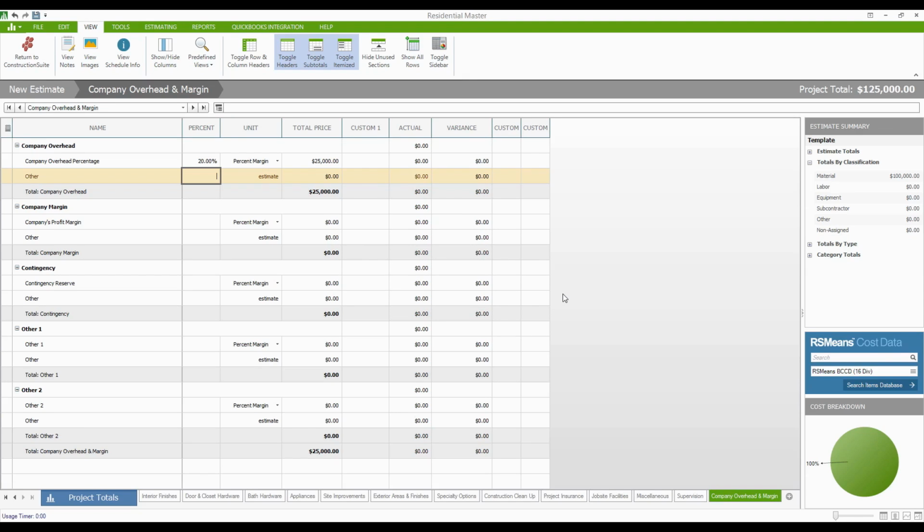The margin percentage is going to look like it should be less, but it's always going to be a greater dollar amount. So 20% of costs is always less than 20% margin. 25% of costs equals 20% margin. And depending on what kind of companies you work with, this could be a pretty important determining factor. One of the partner organizations that we've worked with recently is Remodelers Advantage.